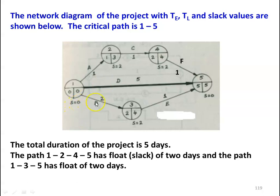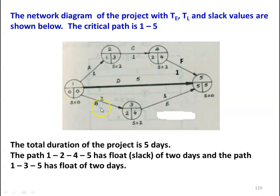The slack values are: S equal to 0 for the first event, S equal to 2 for the second event, S equal to 2 for the fourth event, S equal to 2 for the third event, and S equal to 0 for the fifth event. The critical path is 1-5 with a total duration of 5 days. The path 1-2-4-5 has a float of 2 days, and the path 1-3-5 also has a float of 2 days.